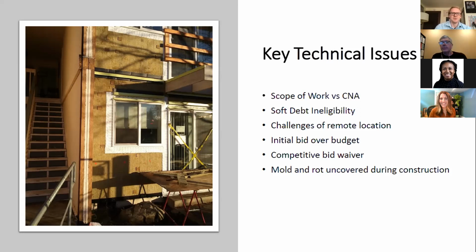Now, prior to starting construction as well, since there was such a big change to the scope, USDA required a competitive bid waiver. Since there was only one interested contractor, we didn't do a sealed bid process. It was more of a negotiated bid, which ended up being very necessary in determining what they could do. USDA required a competitive bid waiver to just break down why it was a fair bid, the qualifications of the contractor.